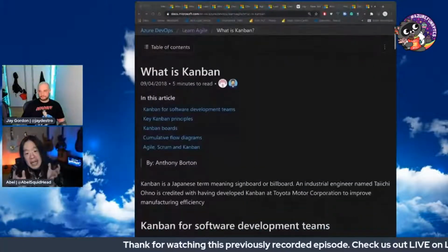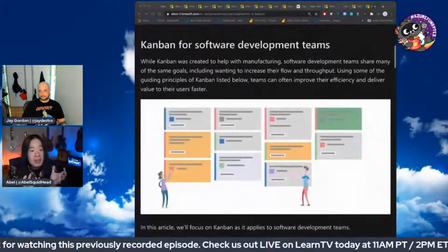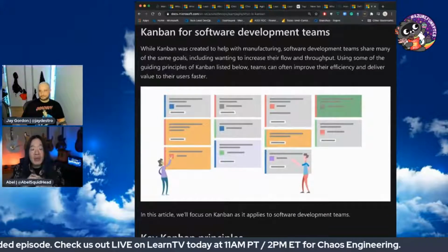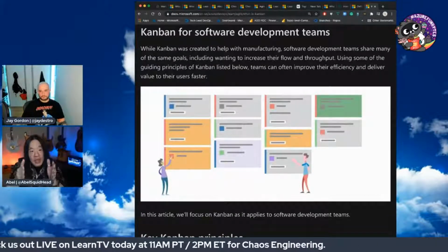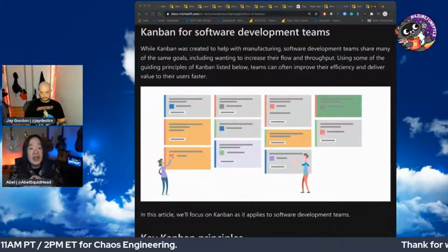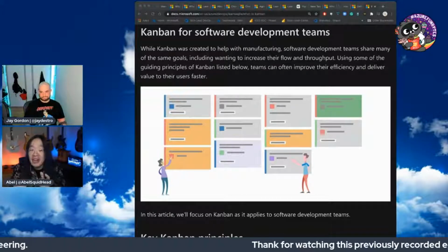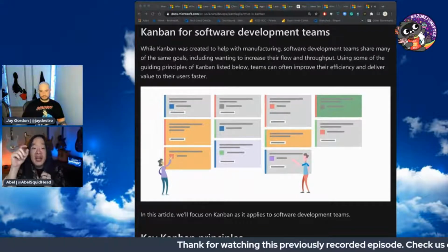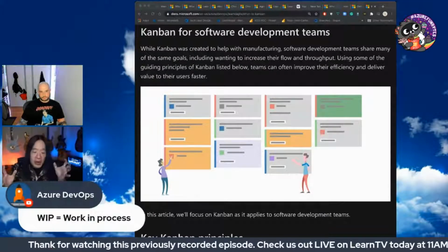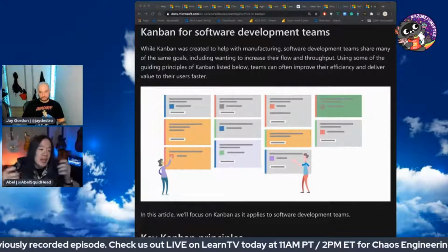An idea inside of Kanban or a Kanban board is you don't want people committing to too much work at one time. So they have what they call WIP limits within a column. That's a work in progress limit, where you can say you can have 3 work in progress, but you're not allowed to drag more items onto it until you finish an item and drag it onto the next column, right? So this tries to make sure you don't commit to too much work and then everything just turns into a mess.